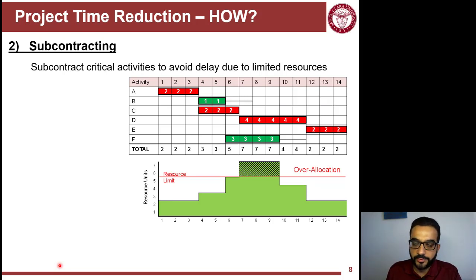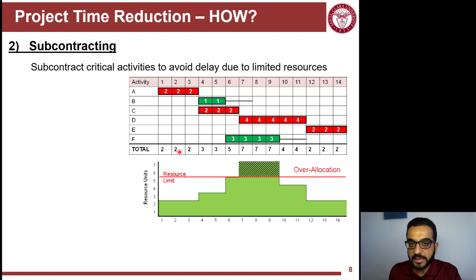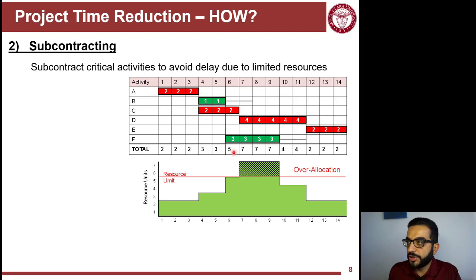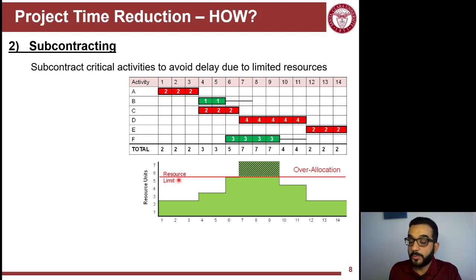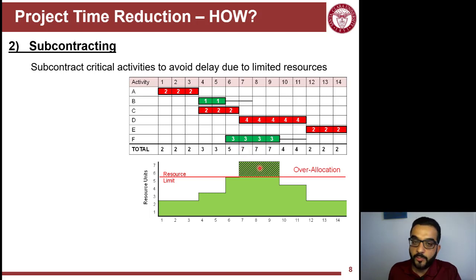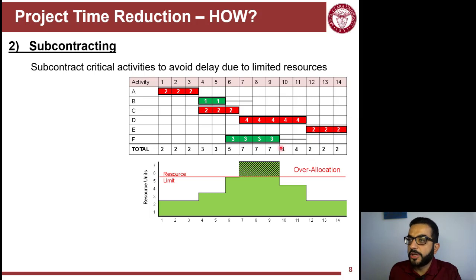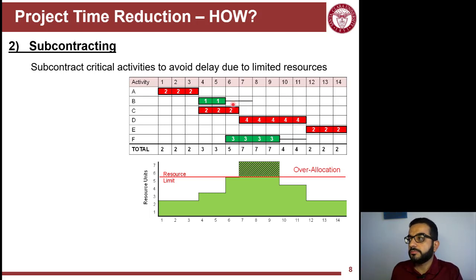The second approach to accelerate schedules is subcontracting. From resource loading and allocation, you can estimate the daily resource needs. For example, if on day seven your labor need increases beyond your company's limit of five laborers, your project will be delayed because you can only provide five. Pushing work down the road because of this capacity limit means the way around it is calling another contractor or subcontractor to do the work — subcontracting due to limited resources.